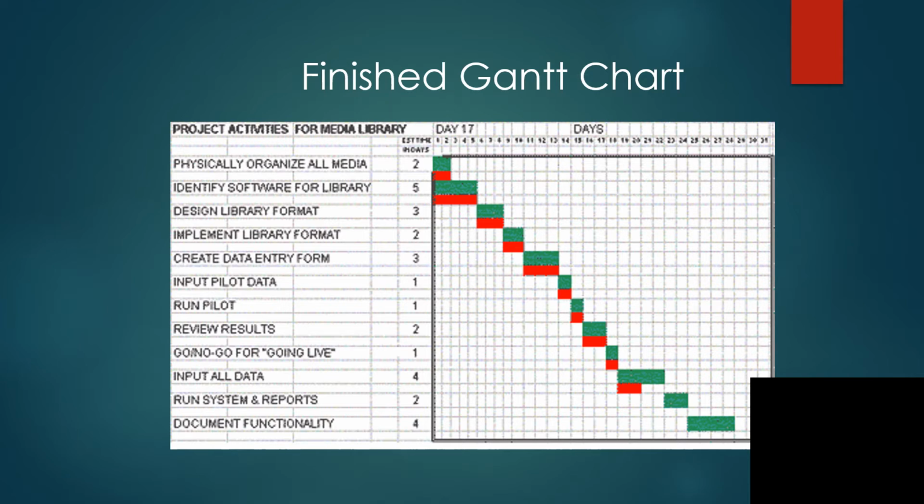So on this slide, you can see an example of a Gantt chart that I constructed following these 7 steps. The project should take 28 days. If you review this chart for a few moments, you may see some limitations, such as the Gantt chart does not easily reveal a project's critical path. The critical path identifies the longest lead time sequence of events. While it is straightforward to determine the critical path for a project with a few tasks, you encounter much difficulty recognizing the critical path for a large project.